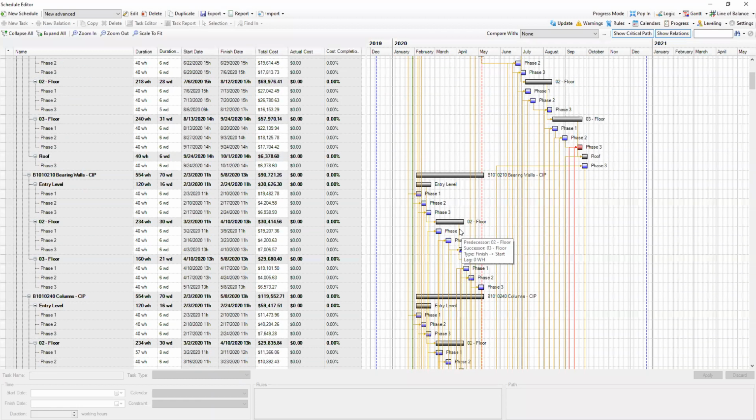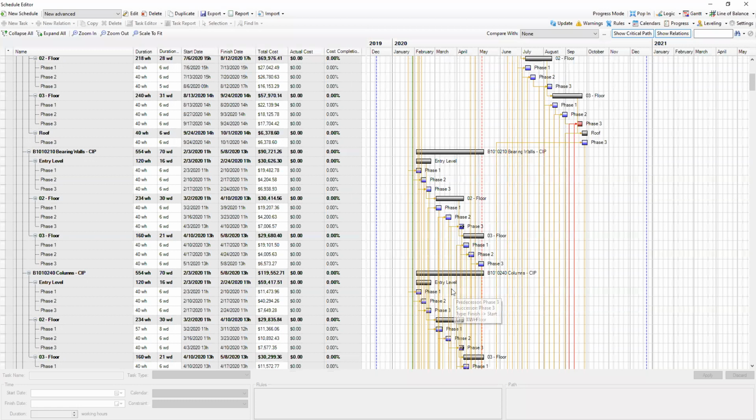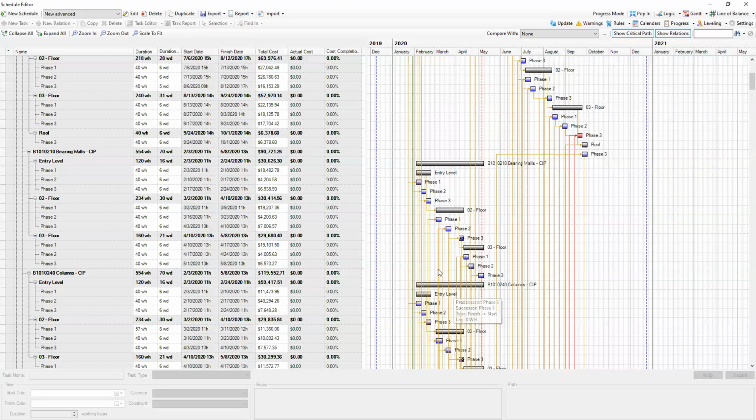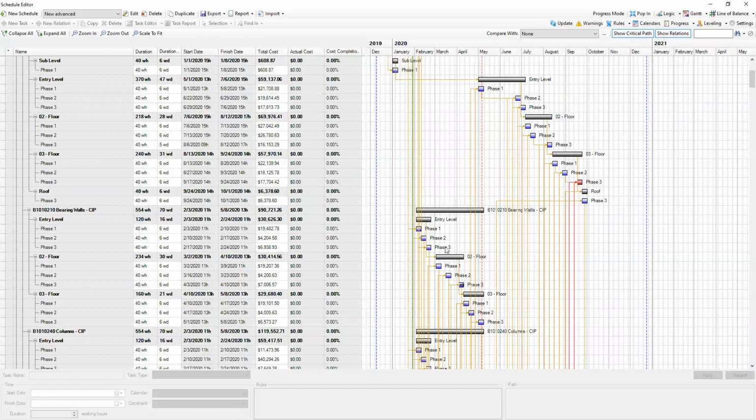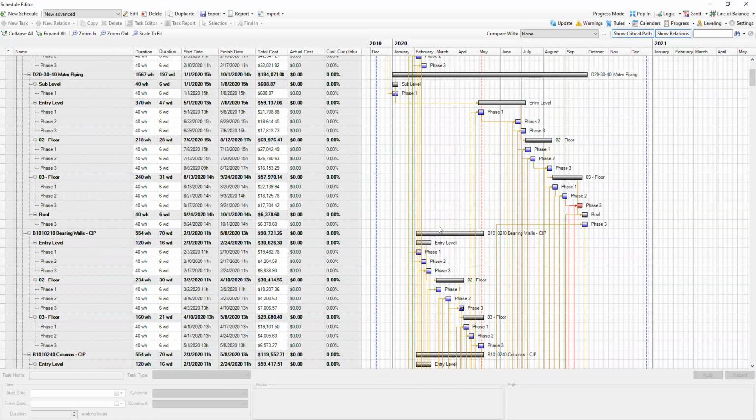I know that there is some software for, let's say, Primavera or similar, which actually controls the quality based on the number of activities and the relation of the activities in the schedule. And also if these tasks are all related or have some kind of links between them.